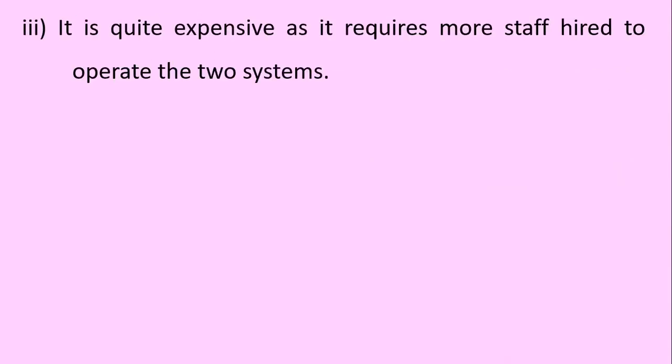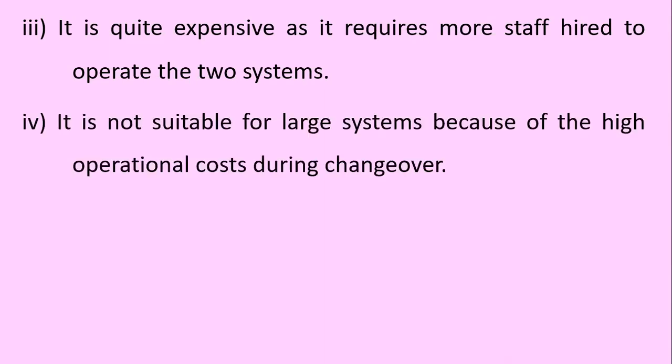Number three, it is quite expensive as it requires more staff to be hired in order to operate the two systems. Number four, it is not suitable for large systems because of the high operational costs that are involved during the changeover.